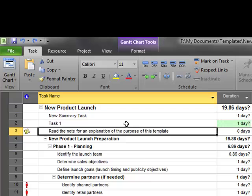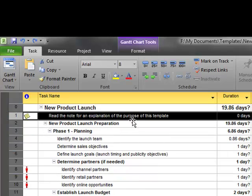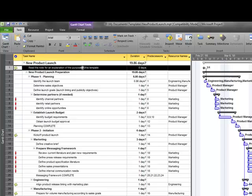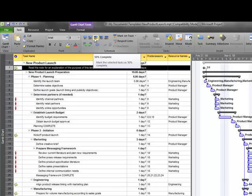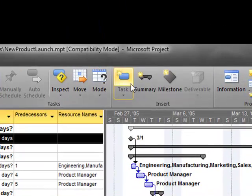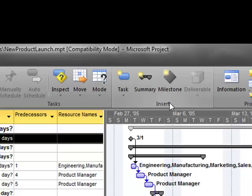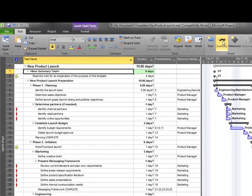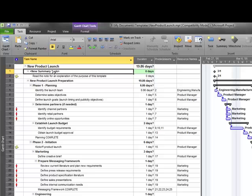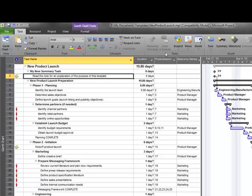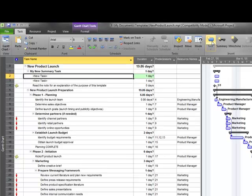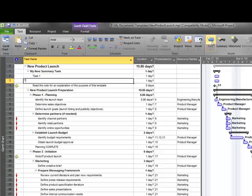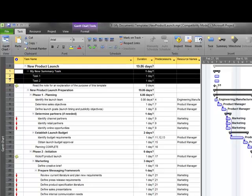I'm going to just go ahead and undo all of those and take a look at how the new tabbed user interface helps us. The Fluent UI not only allows us to do the basic things that we're familiar with, such as changing fonts and doing indents and outdents, setting the percent completes, but it also provides us with some quick actions. So, for example, you'll see this insert area here. And if I click summary, notice what happens down here. I now have the ability to enter a new summary task. So, I can just go in and type my new summary task. And then what I can also do is just click insert new task. Task one, task two. So, I click this button down here and it affected the Gantt chart down below. So, I'll just go ahead and delete that.